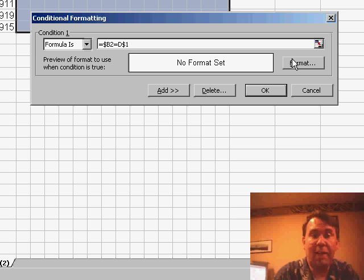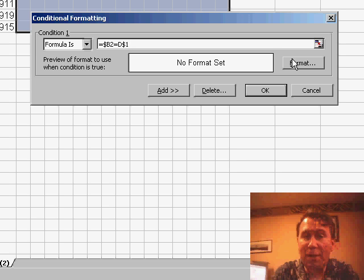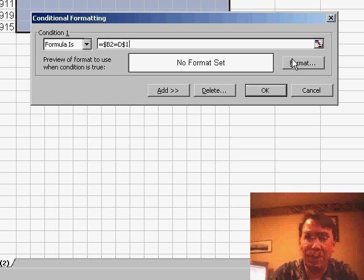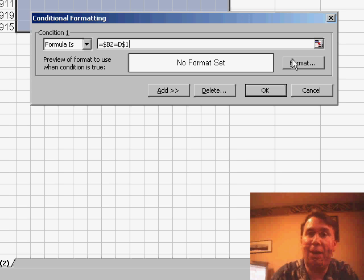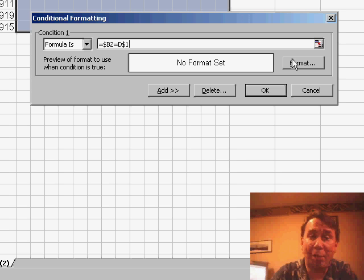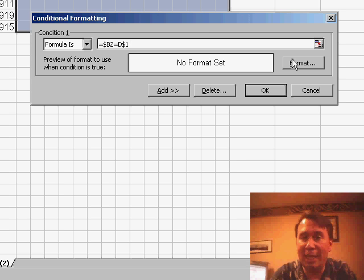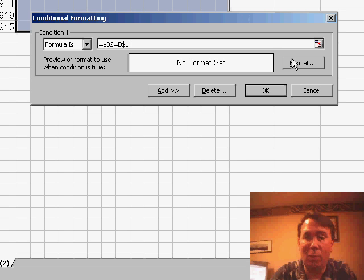My formula is $B2—the dollar sign says we're always going to look at the start date in B2—and see if it's equal to D$1. In other words, look up above us in Row 1 to see if the start year from Column B is equal to this year above us in Row 1.